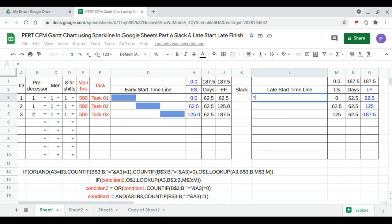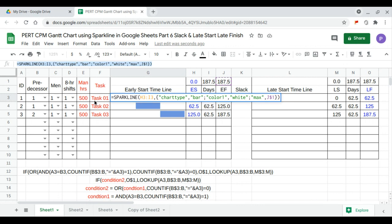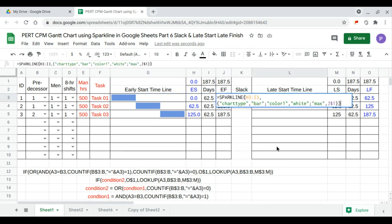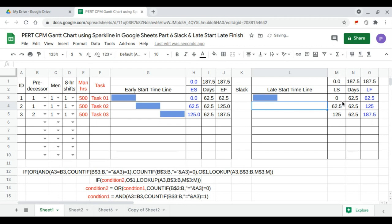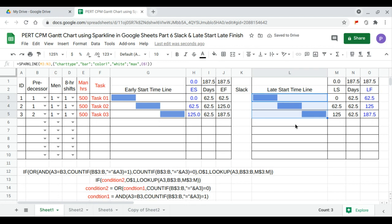We drag the late finish formula downwards for the first three tasks and delete any extra entries. Then we continue with the late start timeline sparkline — it's the same as the early start sparkline, except we replace column H with M, column I with N, and column J with O, using the late start maximum.